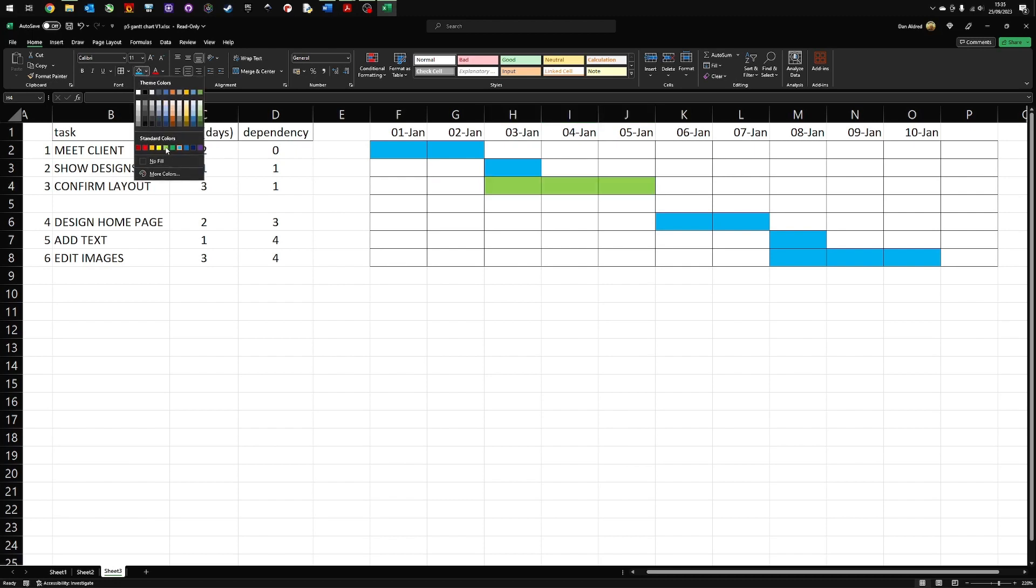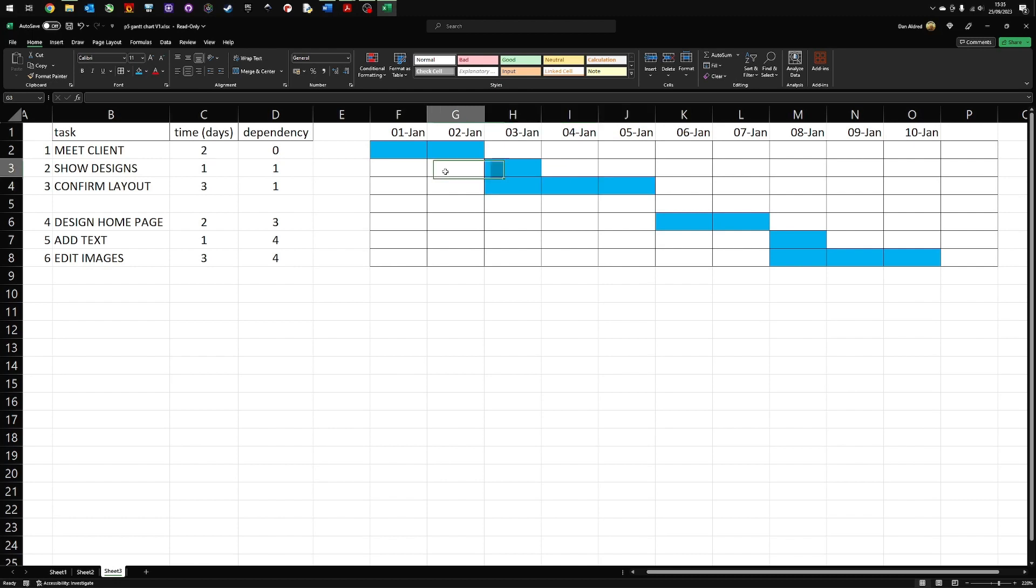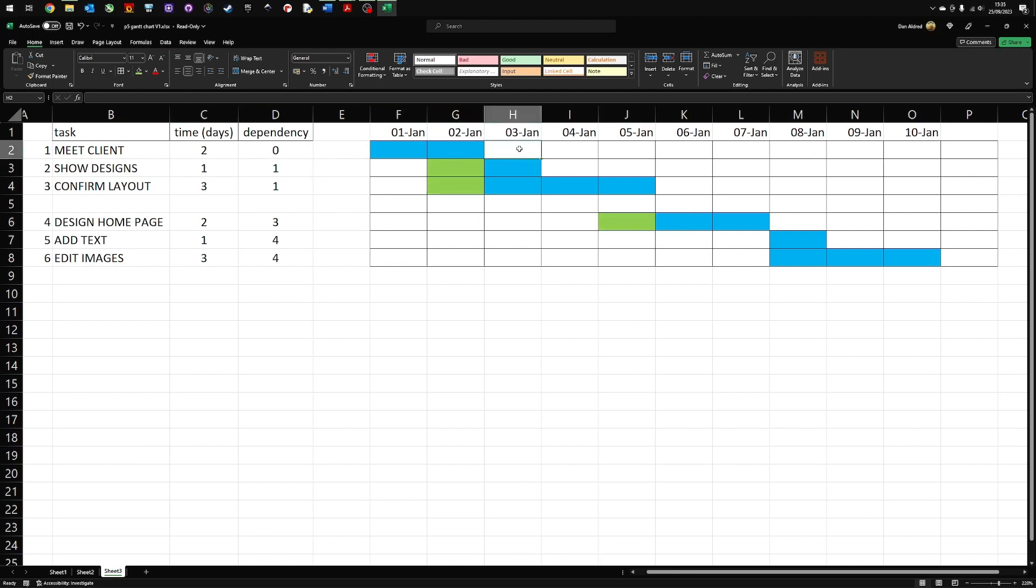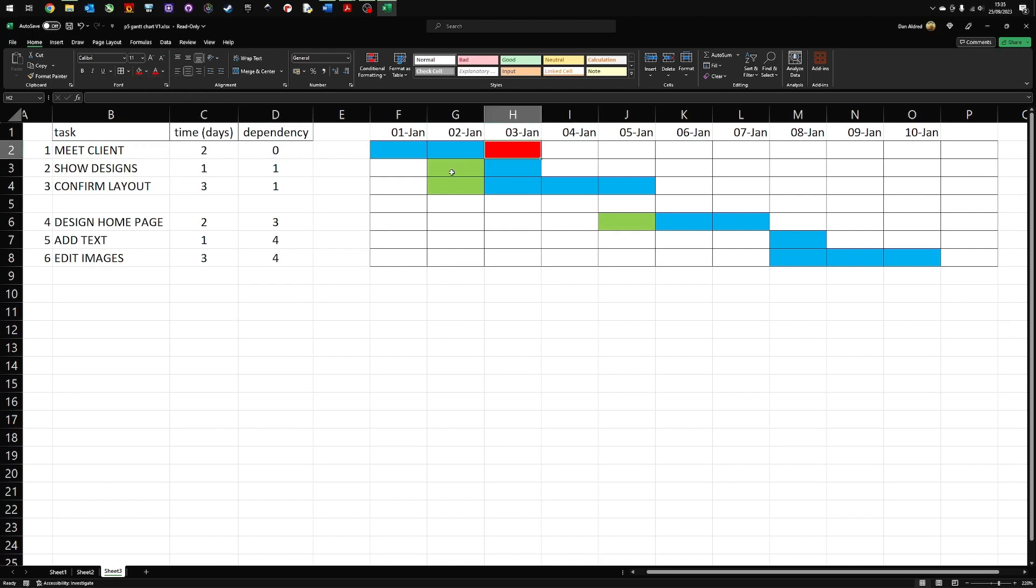You might also want to add in lead and lag time. So lead time is where you can complete the work earlier. So I might meet the client a day earlier, in which case I can start this a day earlier. And I can start this. If that one begins there, I could also start this one a day earlier, which means that this can start a day earlier and so on.